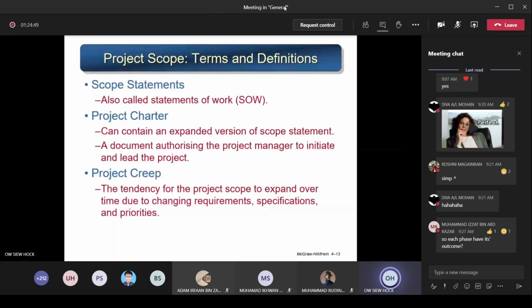First you say this, now you keep on adding, so I cannot finish within the timeline, because you already defined by when you want to deliver. But if you keep on asking me to add some more things, I don't think I can finish by the time that I set, and within the cost that I allocated as the budget to carry out the project, but you keep on adding a lot of things. So that means I cannot meet the timeline. I cannot meet within the budget. You see, it will be over cost.